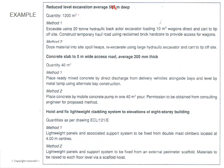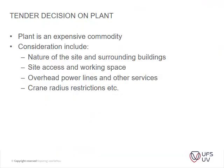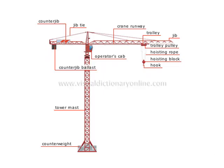You can have one method or an alternative method and compare the pros and cons for costs. The tender decision on plant is important — plant is an expensive commodity. You need to consider the nature of the site, surrounding buildings, site access, working space, overhead power lines, other services, and crane radii.